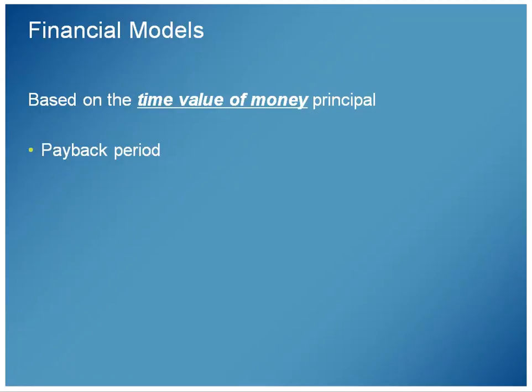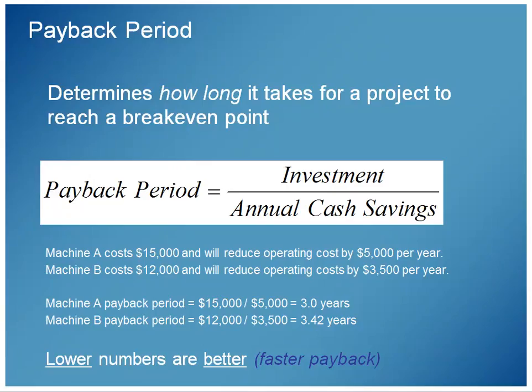So that brings up some interesting financial ideas. One is the payback period. The payback period is the estimate of the time necessary to recoup the costs of an investment, such as investing in a new project if you were a project manager. It determines how long it takes for the project to reach the break-even point. A lower payback period is better. It is financially beneficial to have faster payback. So you want your payback period to be as low as possible.